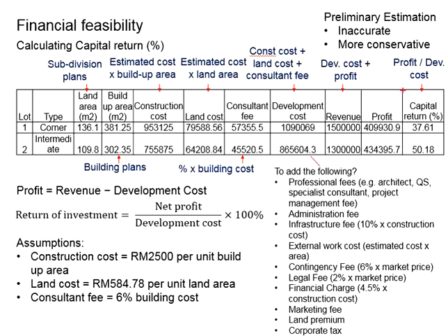You can even compute the return on investment by calculating the total profit divided by the total development cost for an individual project, summing the profit divided by the sum of the development cost. Then you acquire a number for the average capital return out of the entire project.